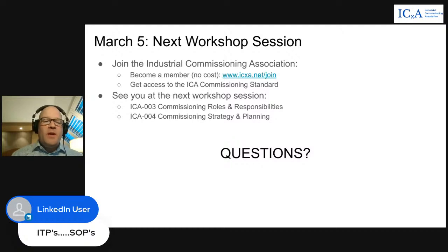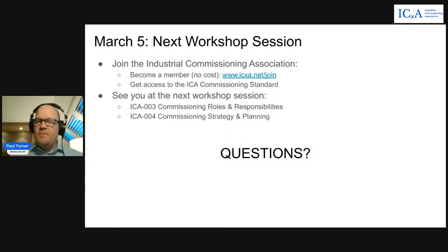SOPs are more so an operating term, standard operating procedures. Those will get written as part of our operational readiness processes to confirm that plant operators are ready for operation of the new facilities. Certainly, there are some SOPs that are written and used during our commissioning sequences, particularly in some of the complex power systems where we do need very specific switching procedures developed. So those are definitely developed as well.